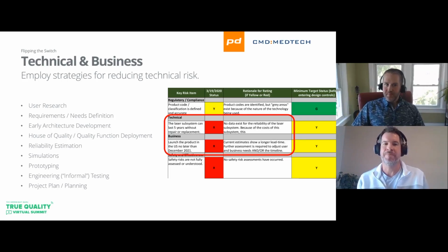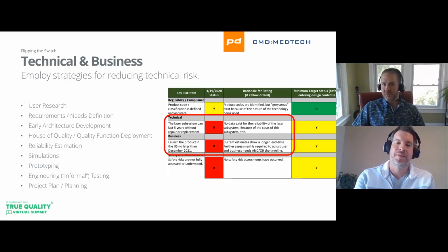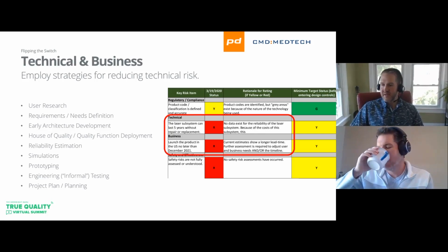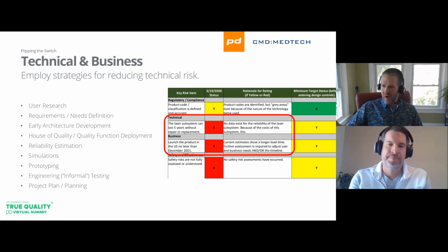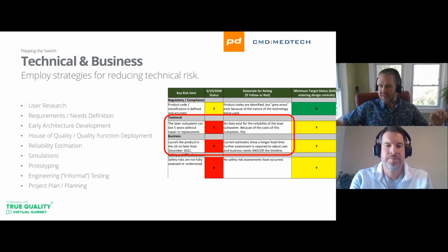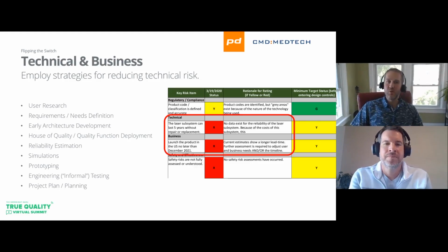Yep. And just to wrap this section up, project planning is a really valuable exercise at this point in time. Again, just building in dependencies of, this has to come before that. So, think about things like sterility validation and things that sort of require final products and then have a big timeline associated with them. So, again, a cross-functional team, making sure we understand what the big dependencies are, what the critical path is. You don't have to have a schedule that's 1,000 lines long and infinite level of detail, but some sort of middle ground where you can at least understand what comes before something else. And again, cross-functional team is critical there.